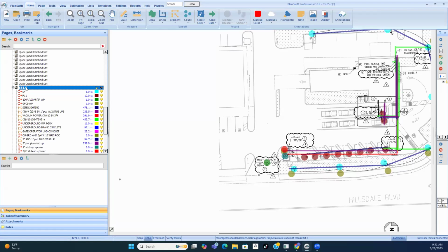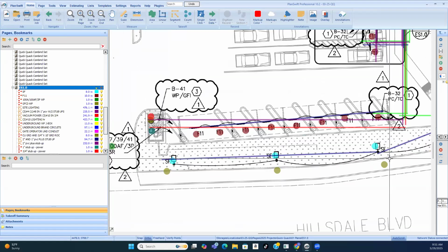So yeah, I mean, just like I'm going to be doing trenches in my backyard. You need some area or some distance on each side of the trench. So if the pipe is small, they're going to need at least maybe 6 inches on each side, minimum.